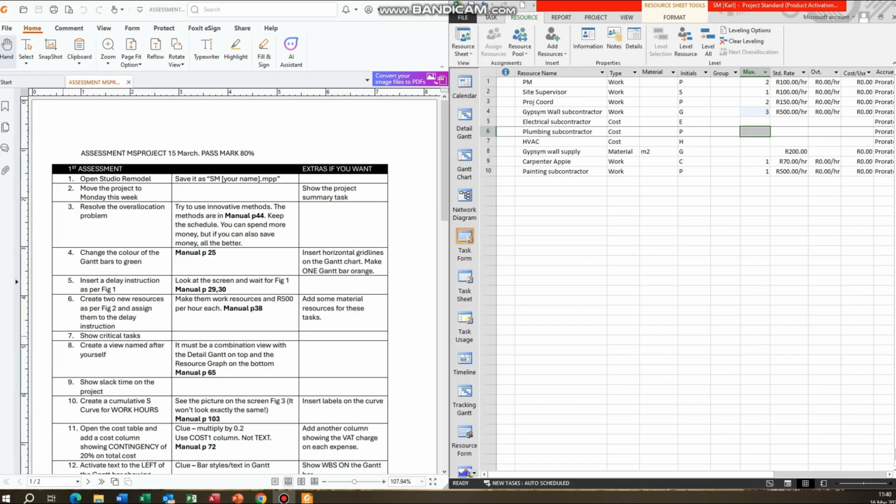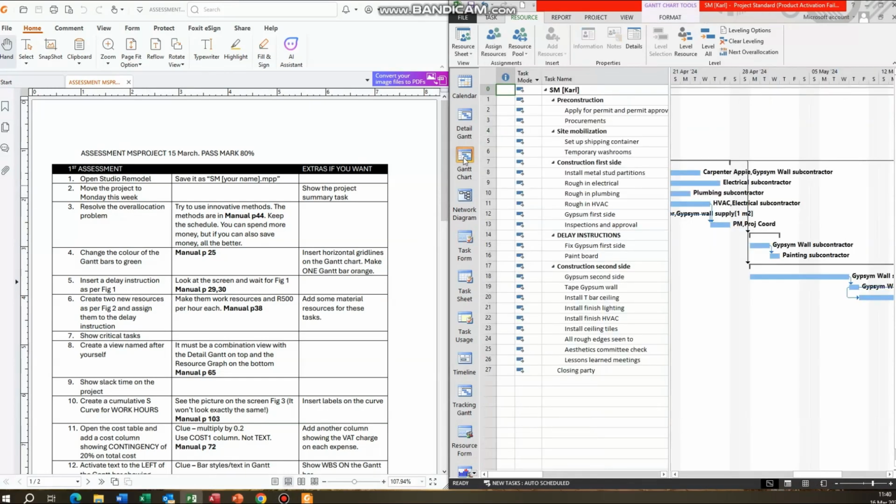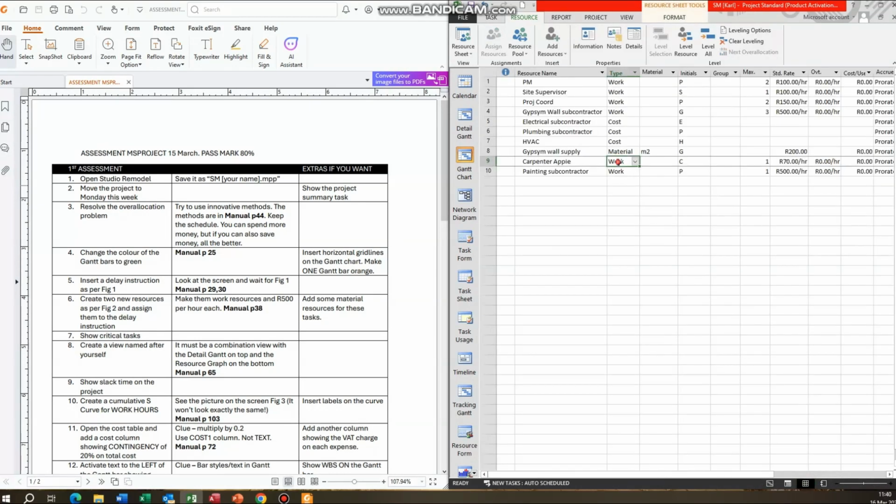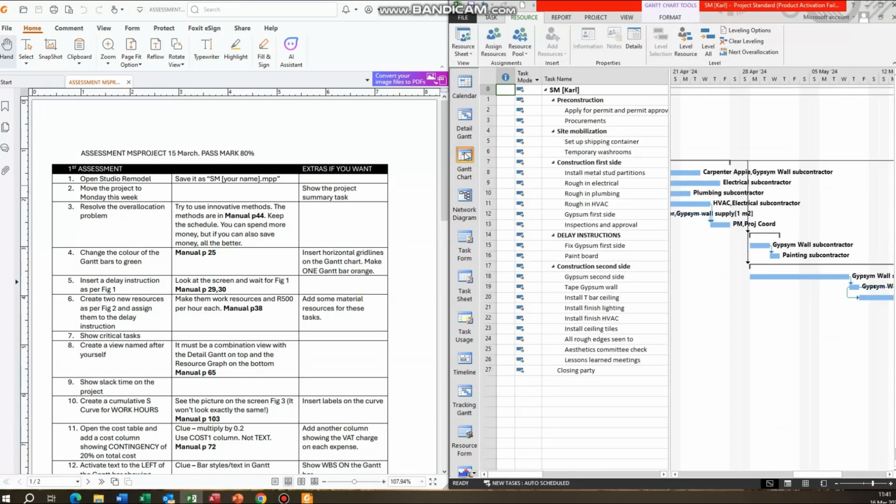Okay, here follows video number 2. If you recall, in video 1 with our studio remodel assessment, we'd got up to number 6, creating 2 new resources for our delay instructions, and we'd placed our delay instructions here and added the new resources. We had to change the resources to work resources, painting subcontractor at 500 per hour, gypsum wall subcontractor at 500. We had to up this to 3 to avoid the over allocation. So we're going back to the Gantt chart now.